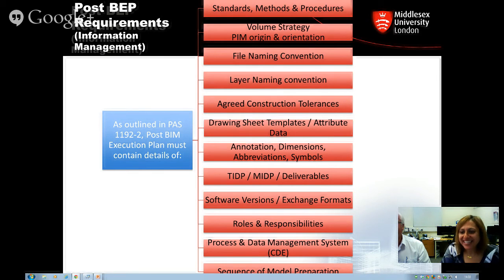Good one, Andy. Is it right to say that the client will have the legal ownership while the design ownership remains with the design author? Tricky one, Tanushka. Depends what you mean by design ownership. Yeah, I guess you could say that. You will have, Tanushka, the usual rules apply. Copyright will reside with every person who authors the design. Architects do author the design, but if you look at something like the Shard or the Cheese Grater, the structural engineer might have had an awful lot to do with design. So the designer, by law, retains the copyright, but grants a license in perpetuity for the use of that design to the client. That's a different issue to owning data in a model sat on servers.